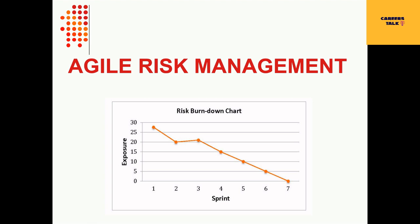Risk management is not always given the same focus in projects using the Agile Scrum framework as it is in traditional waterfall projects. Smaller Agile projects can effectively manage risk through the short iteration cycles that are part of 2-4 week sprints. Larger, more complex Agile projects require some type of formal risk management.